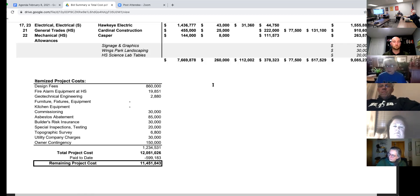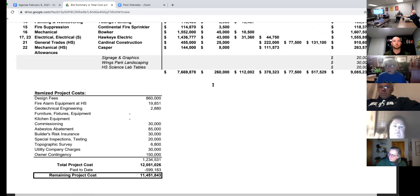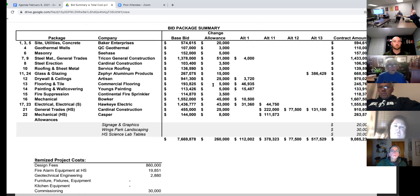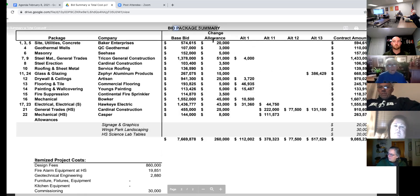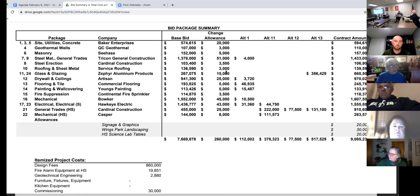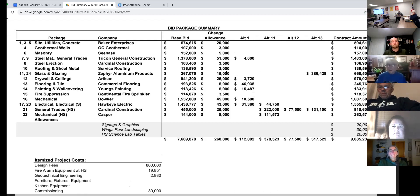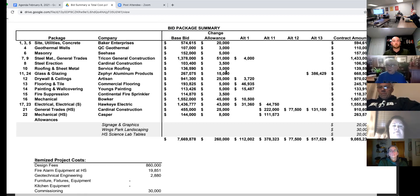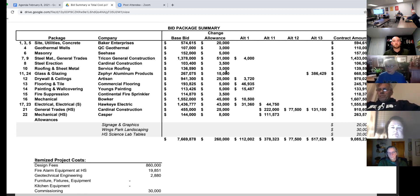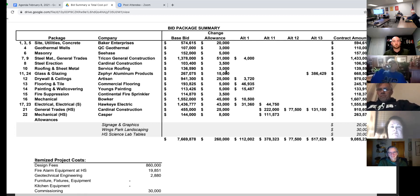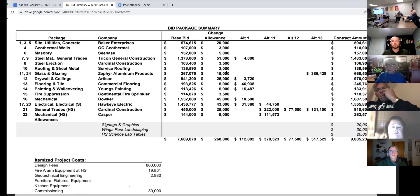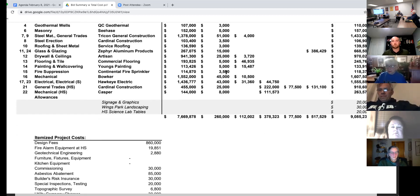Our remaining proceeds will be enough to cover that $11.45 million to do all the projects. A couple of things I do want to point out. The change allowance, those are those small things that come up in construction that each of those contractors is budgeted for. We can take care of things as they come up. They can't just go take that money. They have to use a change order. Those funds are there to help cover those costs. And then if we don't do change orders, which hopefully we don't have very many of them, if the packages are done right, the contracts are done right, and if Kate and her team got all the design right, for the most part, that $260,000 will never leave our bank account.